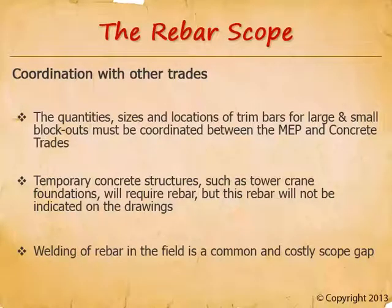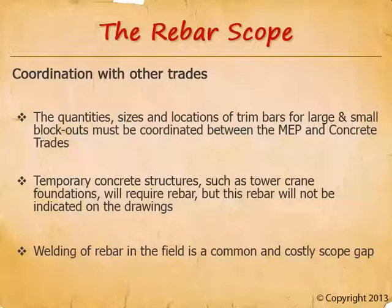Welding of rebar in the field is a common and costly scope gap. Rebar welding requires a special certification, and not that many welders have this cert. Rebar subcontractors don't keep union welders on staff and routinely exclude welding rebar. Structural steel subcontractors exclude this as well because the rebar is not part of the structural steel system, and miscellaneous metal subs exclude it because they don't do rebar. In the end, we've got to convince one of these three subs to do it — our first choice is always the rebar subcontractor, second choice is usually the structural steel sub, and if necessary we go to the miscellaneous metal sub. It may involve one of these subcontractors calling the union hall and finding a welder with this certification that they can hire.